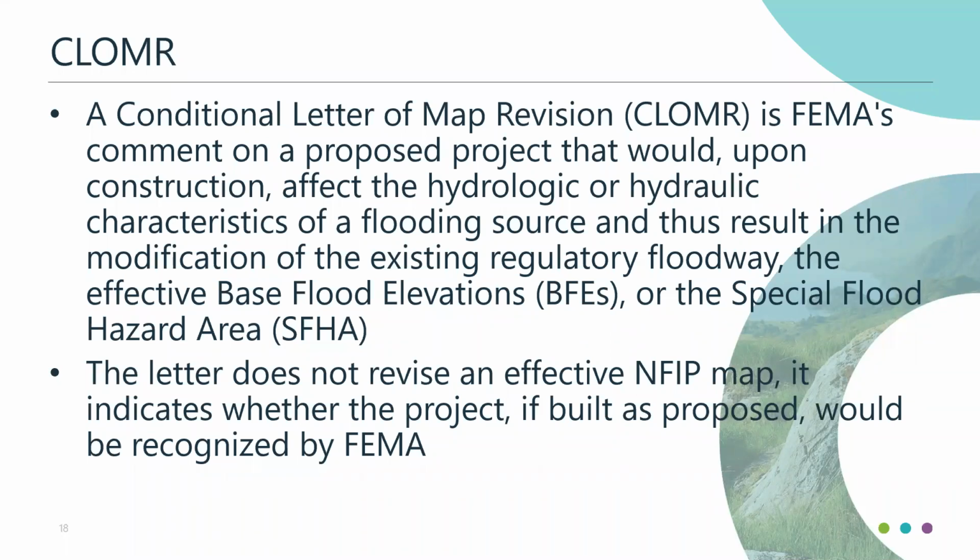The important thing to note, though, is that by doing this, it helps limit risk. Imagine, I want to propose to put a ton of fill in a floodway, or I'm going to build a dam somewhere that's going to affect the maps. Before you go moving dirt around and have a huge expense associated with that, this is the ability for you to get FEMA's comment to make sure that you're doing that in accordance with their requirements and that the outcome is going to be positive.